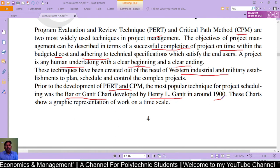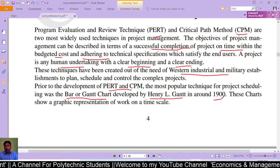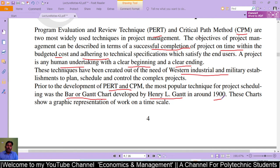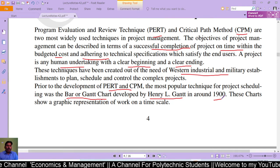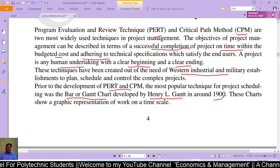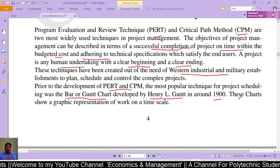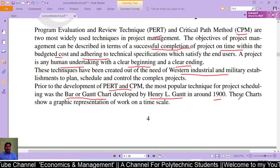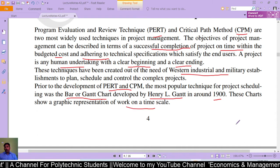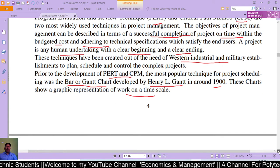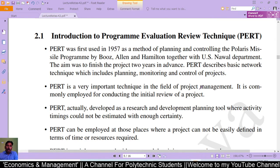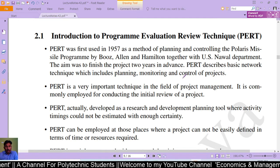When PERT and CPM had not yet been developed, the bar chart and Gantt chart were developed before them. The Gantt chart provided a graphic presentation of work and time scheduling — showing who would complete which tasks and by what time — and this technique was used to complete projects.